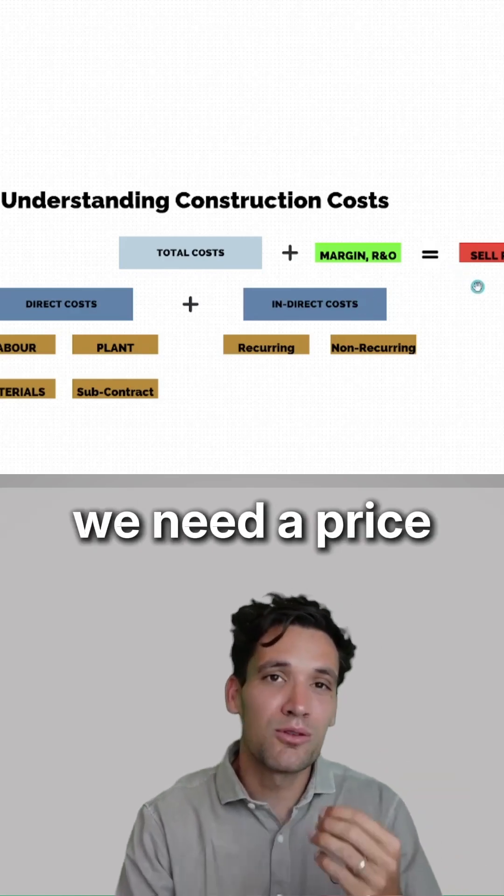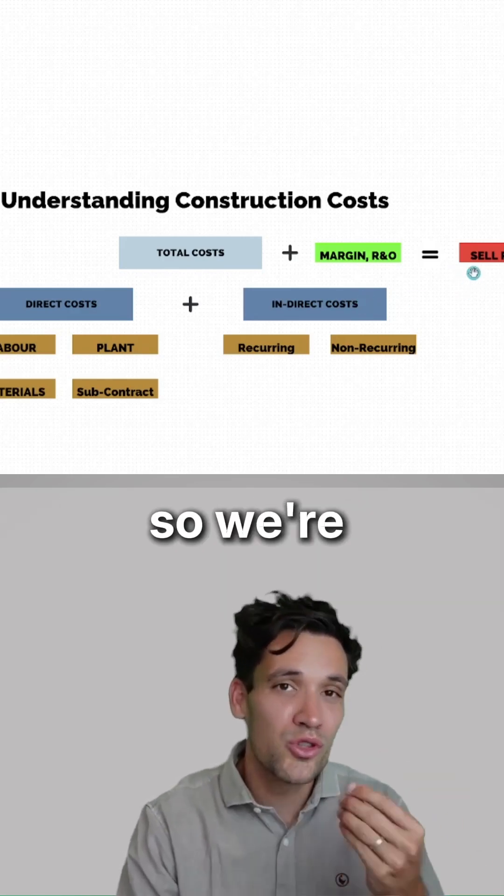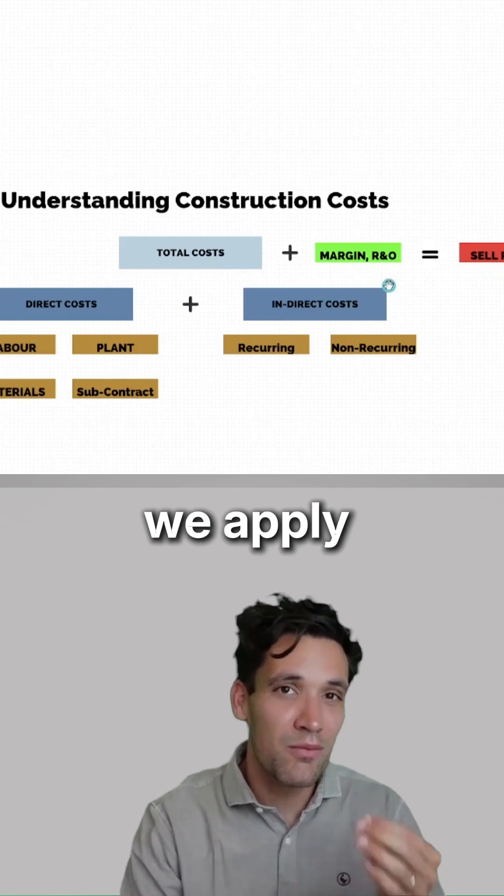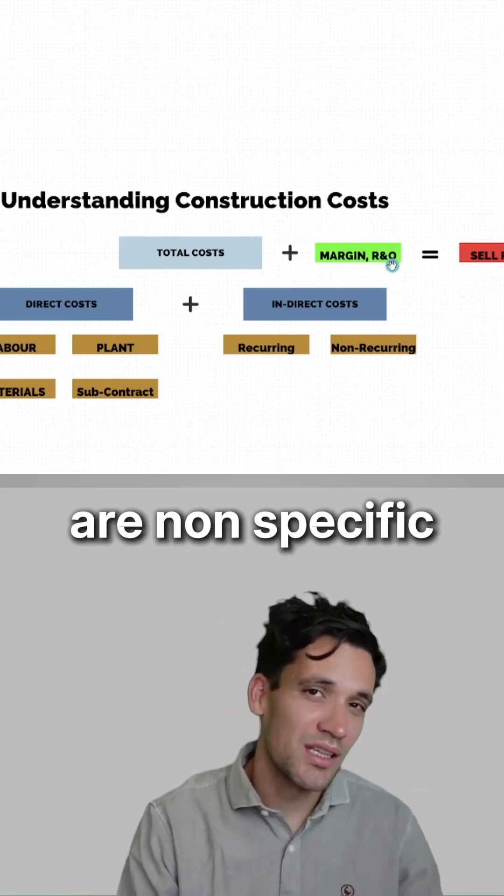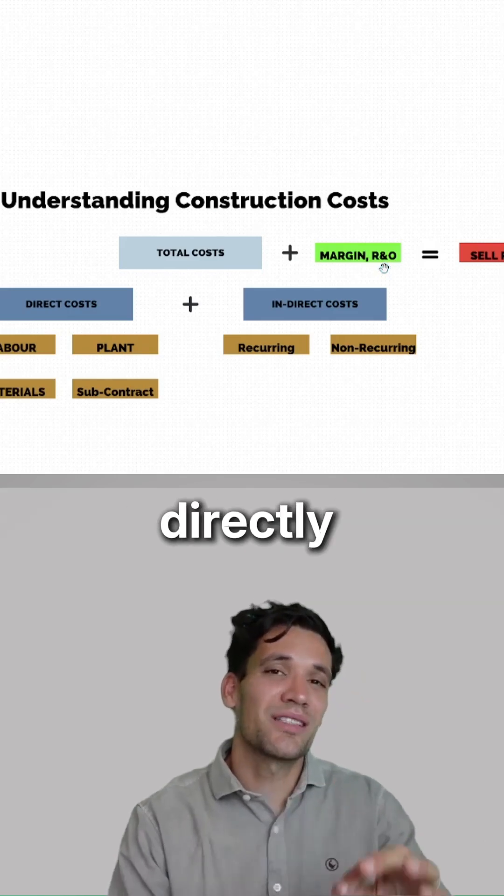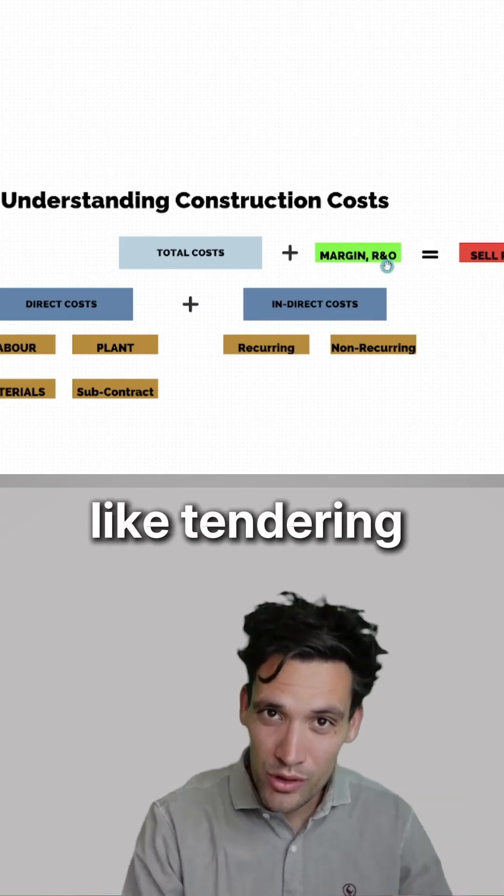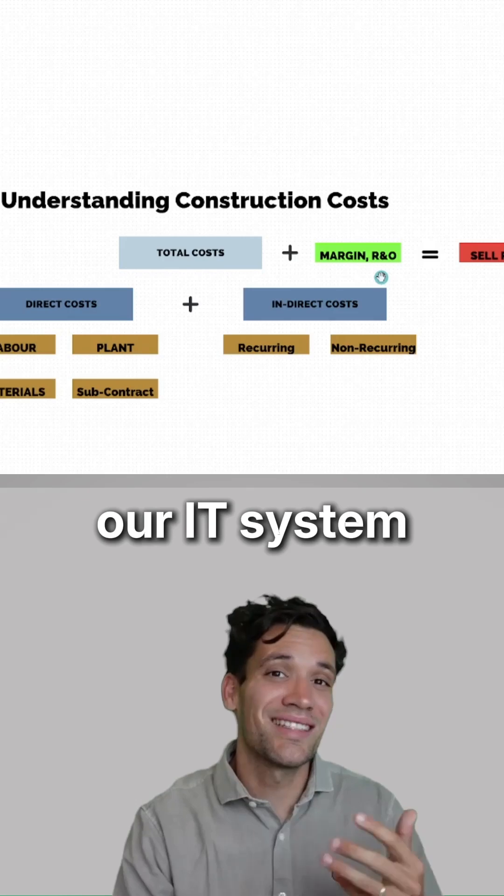And then on top of that, we need a price we're going to bill our client for, so we're making money. That's where we apply our profit margin and corporate overheads. Corporate overheads are our non-specific business running costs that aren't directly attributable to any project, like tendering for new work or the cost of our IT system.